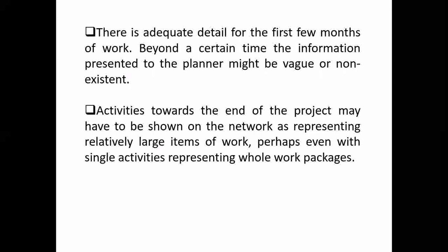So activities towards the end of the project might have to be shown on the network as representing large items or relative items of the work. So perhaps even with a single activity representing the whole work package. By the way, a work package is a piece of work that is accomplished in the project.